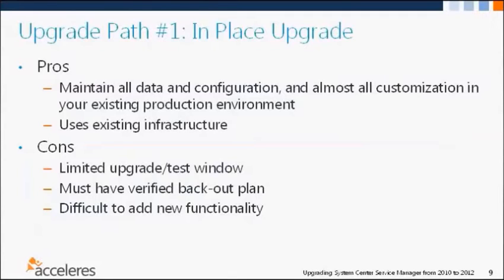Which really takes us to that second point there. You need to have a verified backout plan. And by verified, we mean tested. It's somewhat safe to assume that if you restore your database backups and roll back to your snapshots of your VMs, that things will work. But we definitely advocate going through those motions in a lab environment, one that, like Pete said, you could duplicate from your production environment. We definitely advocate going through that process and making sure that it's successful and that you understand all of the steps and the order of those steps that are involved.